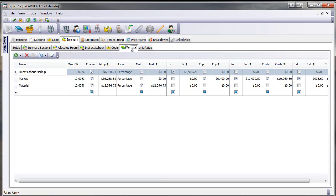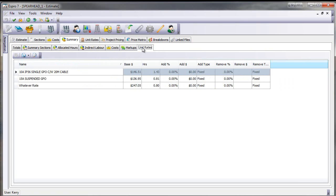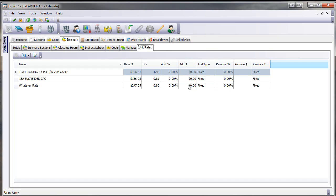Or I can come to my mark-up tab, where I can have as many mark-ups, and I can apply those mark-ups to material, labour, equipment, sub-E's, whatever. And with my unit rates, here in my unit rates, the scheduler rates have now been costed. I can now go what I want to add to those, so I can go and put an addition percentage or a removal percentage, and that will recalculate the sell price or the removal price for these items.